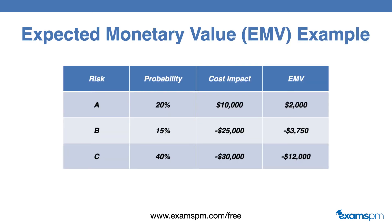Let's dive into one of the tools and techniques in more detail — an example of EMV. Here we have three risks on our project: A, B, and C, with their probability and impact values. To calculate the EMV, we simply multiply the probability by the impact. For risk A, we multiply 20% by the impact, which gives us $2,000. A positive risk gives a positive EMV, and a negative risk or threat gives a negative EMV. In the end, we sum everything up to know how much we need in our contingency reserve.